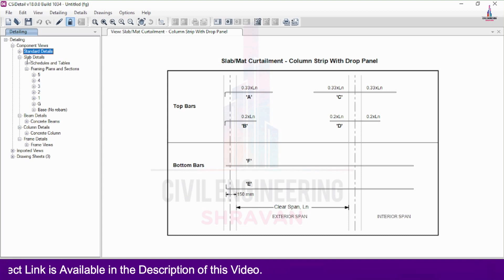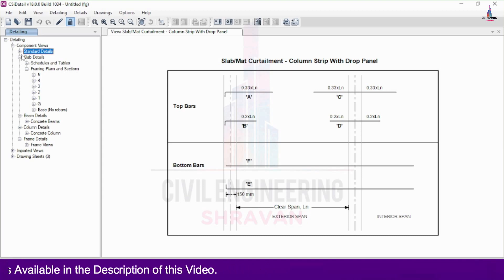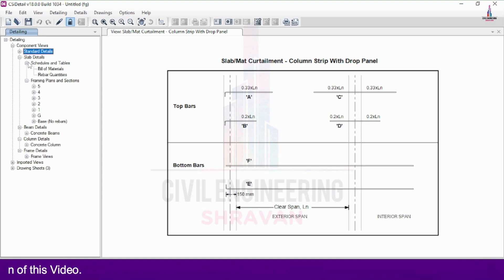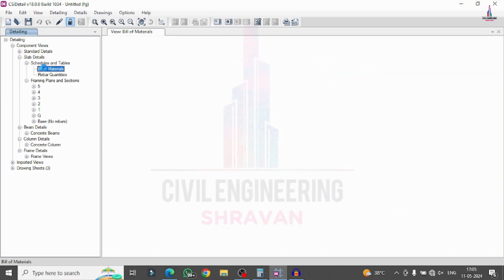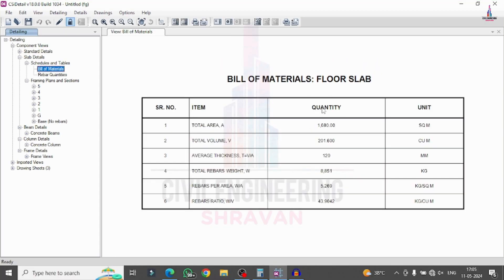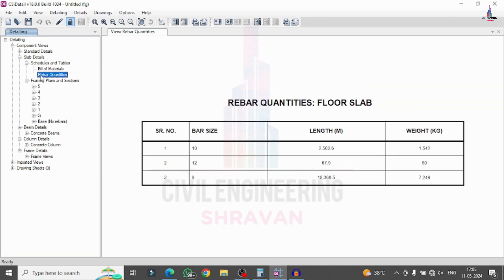Again it is consisting of the slab detailing second option related to this. Select the schedules and tables. From this we have to select the bill of materials, which is consisting of the complete abstract of the quantity of the material required for construction of this slab. In the same process, rebar quantities — length of the rebar and weight of the rebar which is required for this slab.